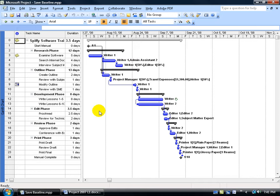In other words, after you complete your project plan and before you actually begin entering in your actuals or starting the project, you can save a baseline or a snapshot to track specifically the task duration, start and finish dates, and the costs. So you can tell later on whether or not you've deviated from your cost, from your baseline cost, or your baseline start dates and finish dates and the duration of your task.